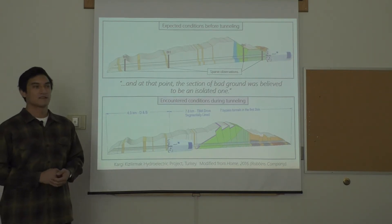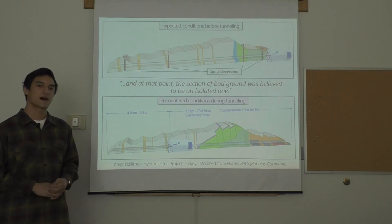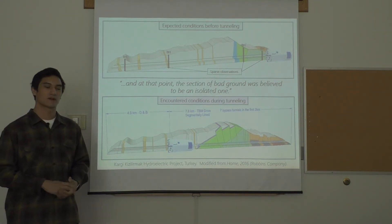During the first two kilometers of boring, unexpected ground conditions were encountered, leading to seven distinct stoppages of the tunnel boring machine, totaling over three months of project delays.